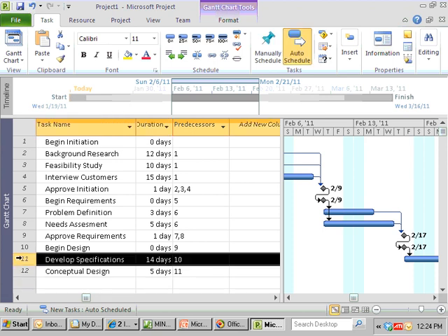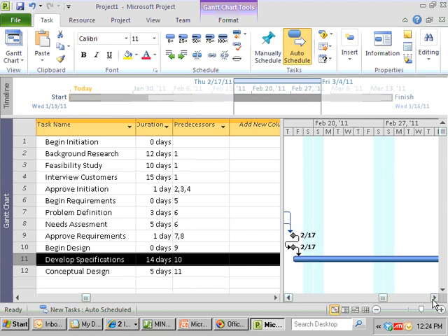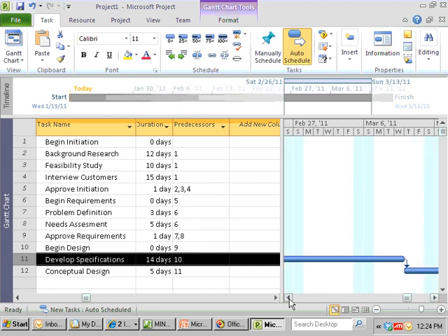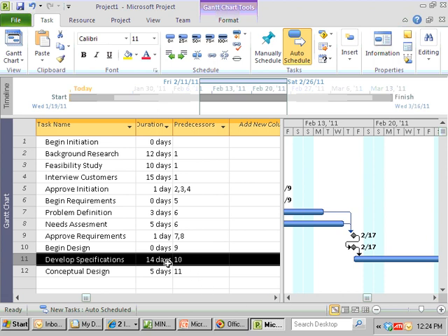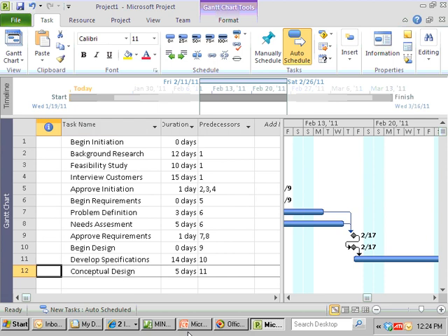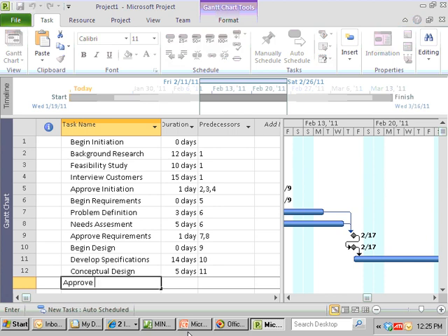Well, no problem there. You just put in the task or tasks that it follows, but we're getting a different look over here where one activity follows on another. And so that's the thing about projects quite often: you can't do things in parallel. You need the information from developing the specs to do the design, at least per the project manager. In this case, you might quibble, well, you don't really need all the specs before you can begin a design, and in some cases that's true. We'll have a future lesson about how to do something about that, but let me just get this bare bones in.